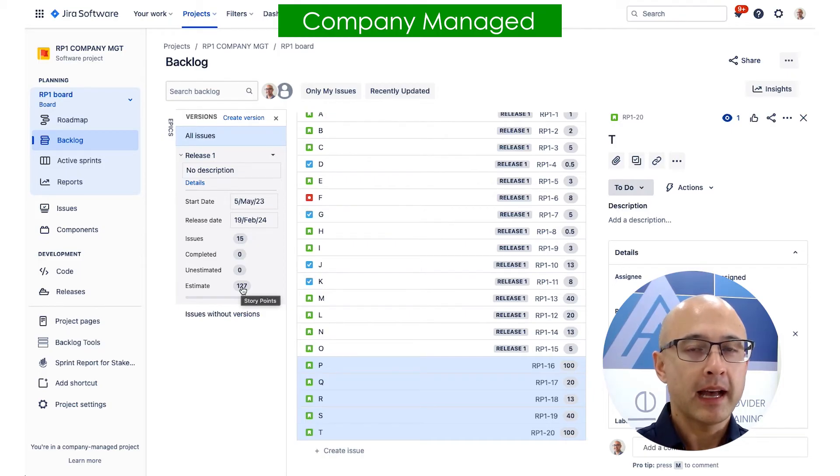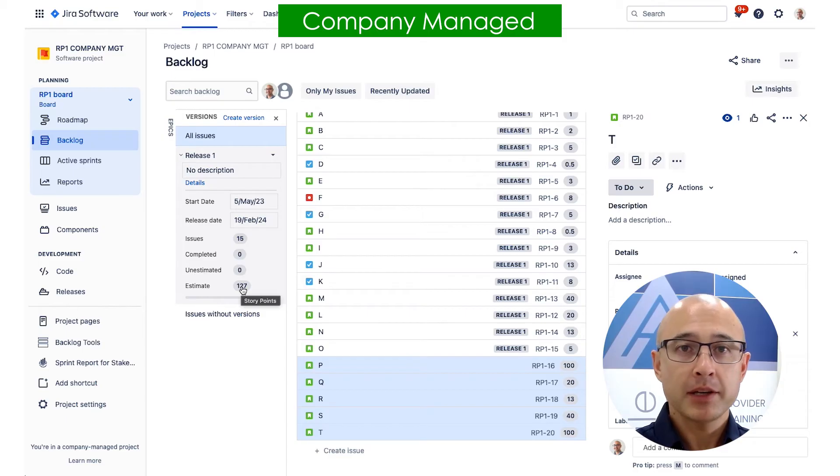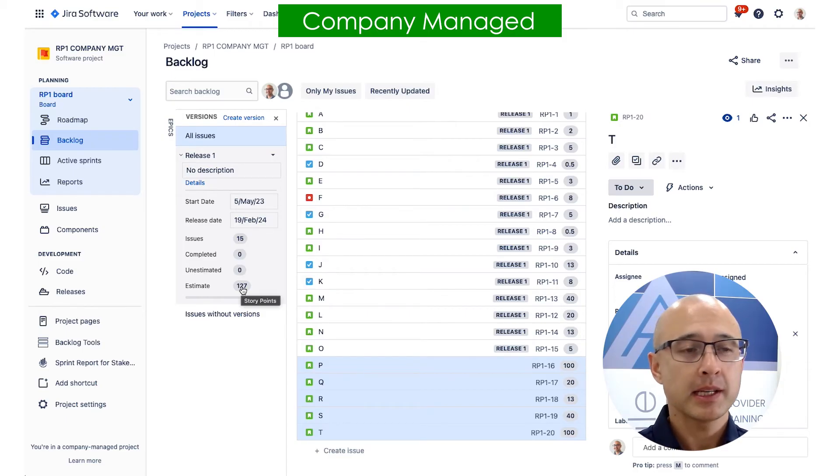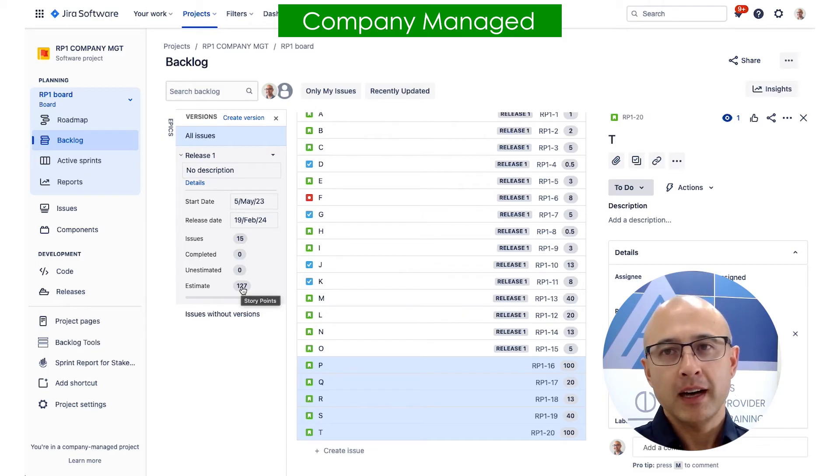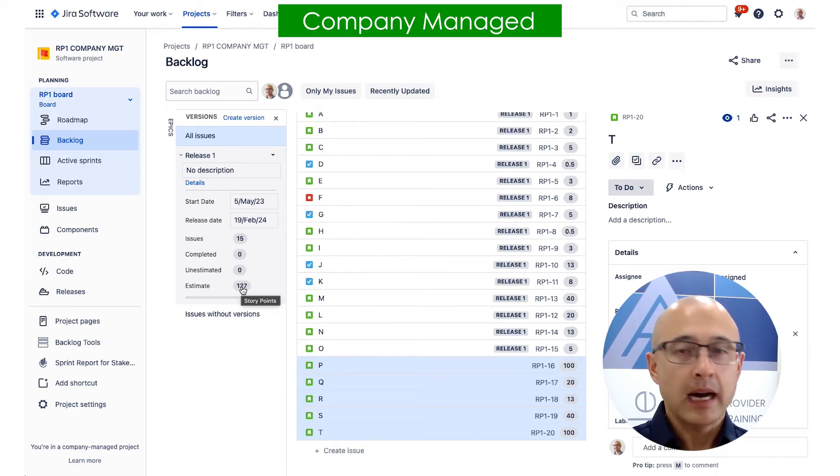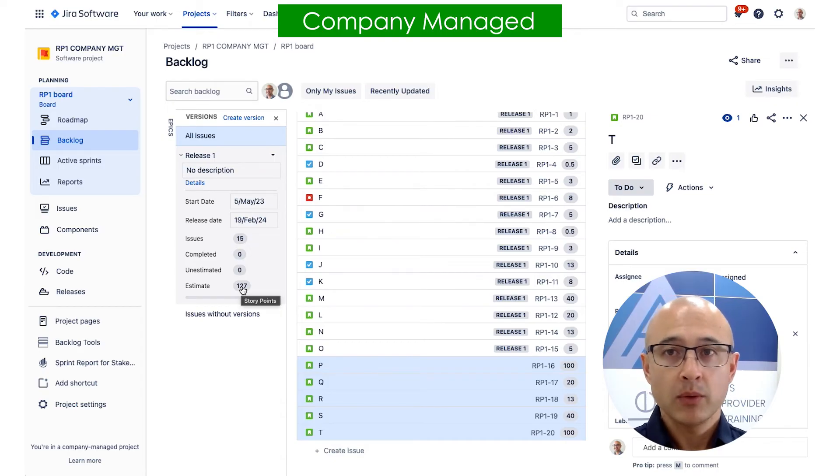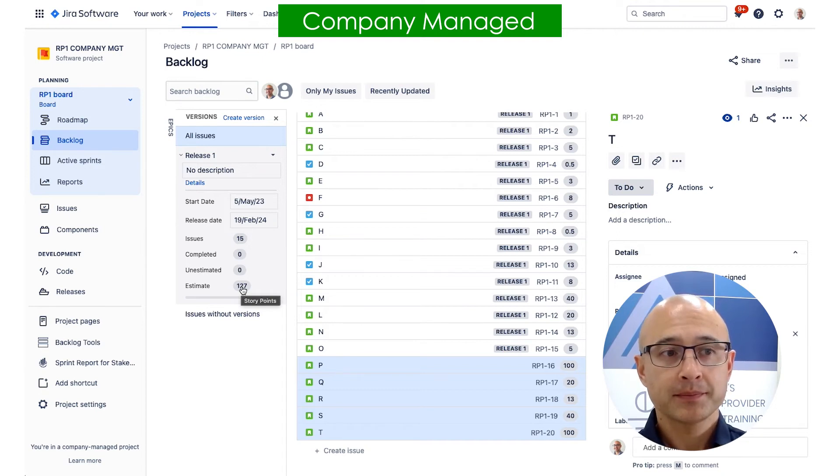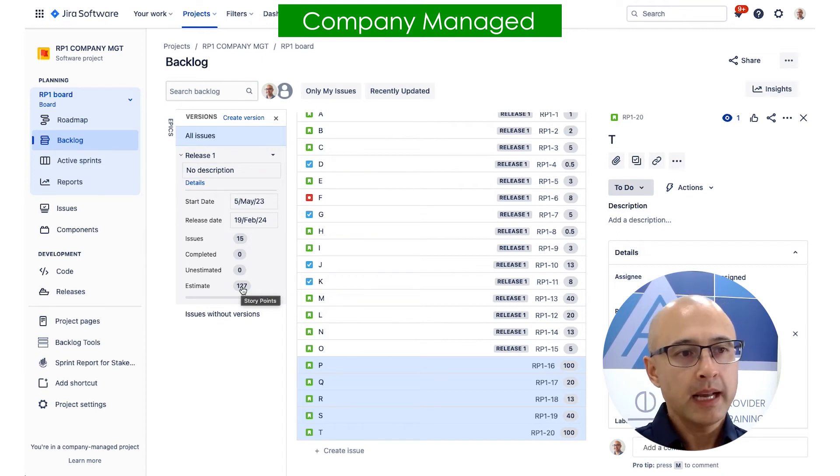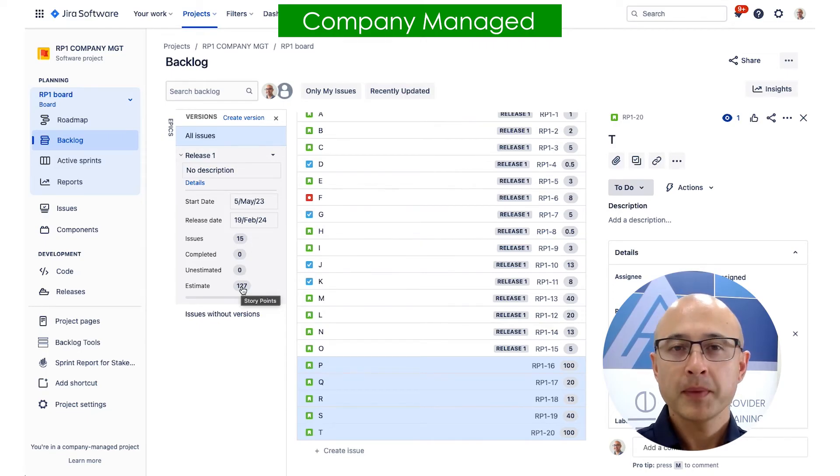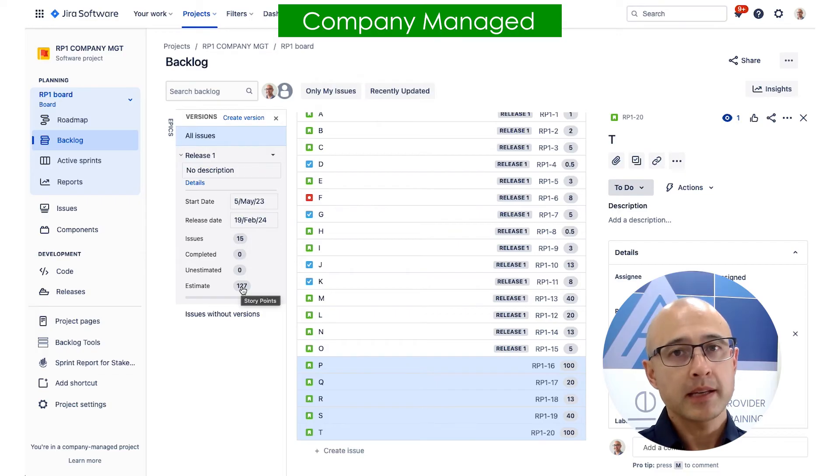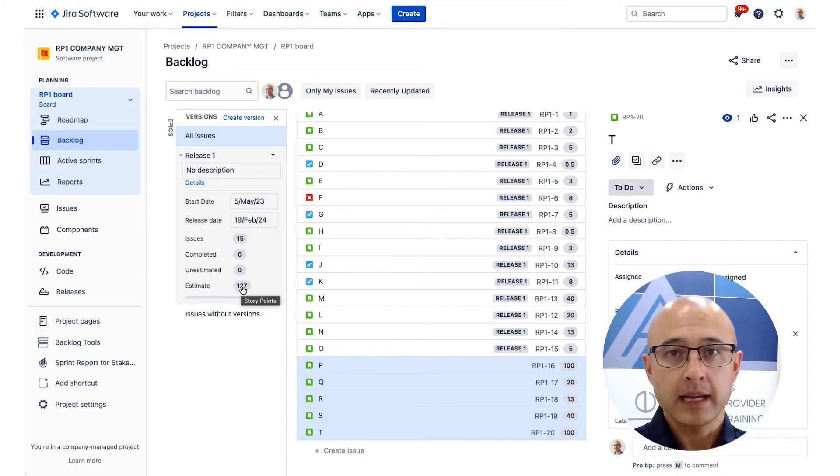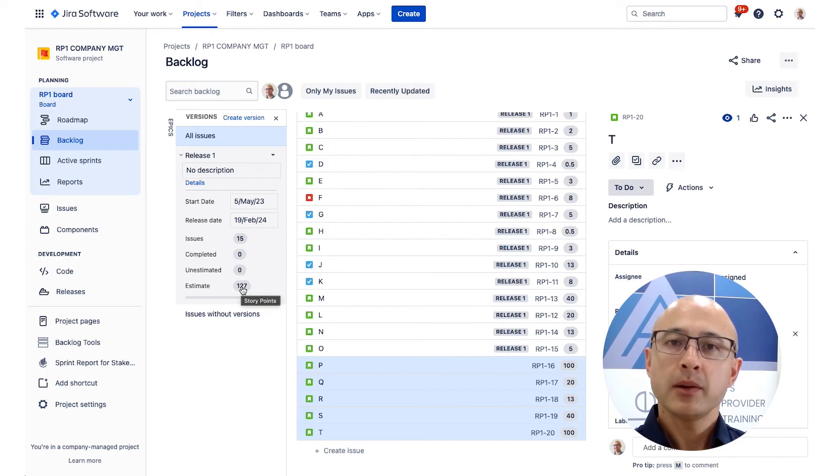Now, keep in mind that I am using a company managed project here, and it's possible to do it with a company managed project. But if you're using a team managed project, unfortunately, you won't be able to do this. And you'll either need to update the product backlog items one by one, or you can use JIRA's bulk update feature. Okay, so now we know that to deliver A through to O, we've got 127 points. Now we need to go back to our stakeholder and communicate how long is that going to take to deliver?